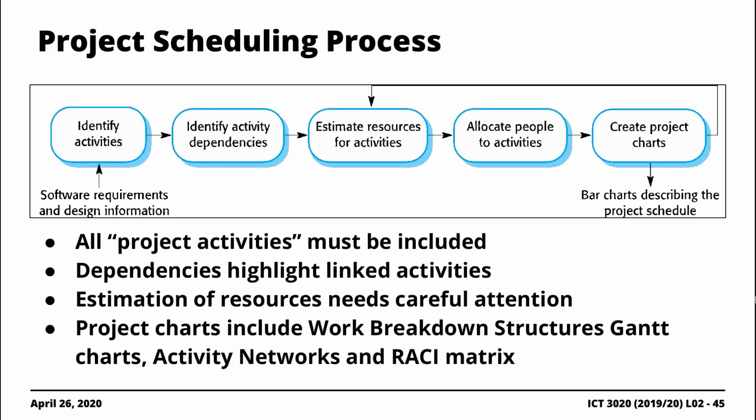Okay, so in terms of the end-to-end process involved with project scheduling, you go through a process where you first of all start by identifying activities associated with your project, right? So in the case of these group-based projects that we are working on, you identify key activities associated with your project. The obvious ones would be the ones associated with the SDLC, so the software development lifecycle: requirements engineering, design, implementation, testing, perhaps deployment, right? There's potentially other tasks that are embedded.